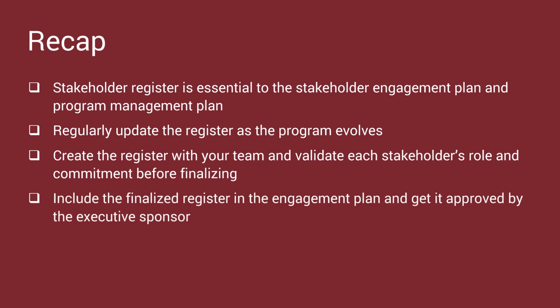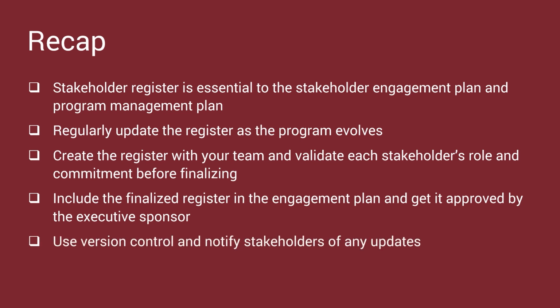After addressing any issues, you should include the finalized register in the stakeholder engagement plan and get it approved by the executive sponsor. This ensures clarity and commitment across the program. You must regularly update the register using version control and notify stakeholders of changes.